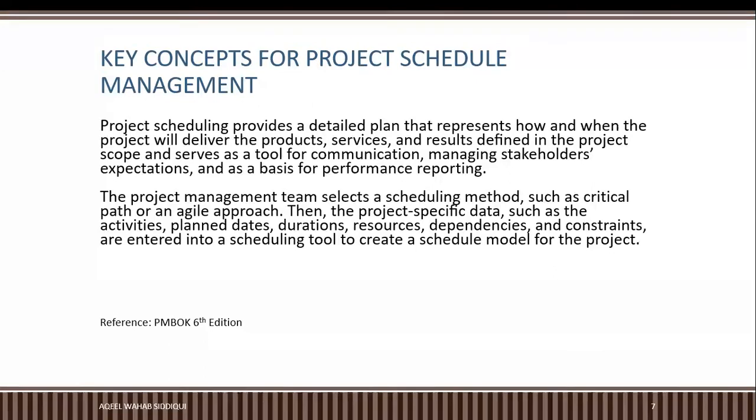The project management team selects a scheduling method such as critical path or an agile approach. Then we will talk about these things in detail in upcoming lectures. Then the project specific data such as activities, planned dates, durations, resources, dependencies and constraints are entered into scheduling tools to create a schedule model for the project.